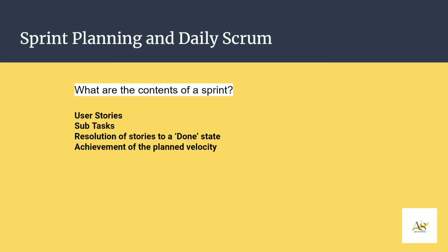Having the right set of subtasks will ensure a couple of things. One, that we actually deliver in the user story what we started out to deliver. And secondly, it is actually being delivered in a quality fashion, in terms of all the right steps that needed to be completed, all the right testing that needed to be completed, and any other dependencies that might be needed to ensure that the user story is actually done in an acceptable state.